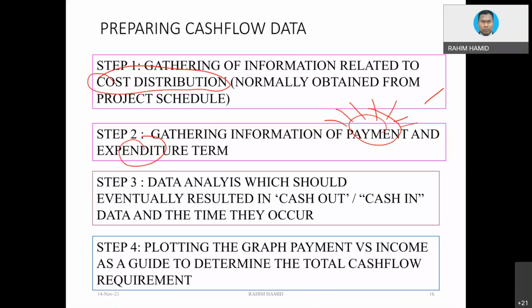Couldn't remember. Okay, let's say in government, for instance, you are not able to provide the performance bond because there is no insurance or bank that basically wants to guarantee you. Okay, then how are you going to start the project? Well, you can start with the guarantee money.